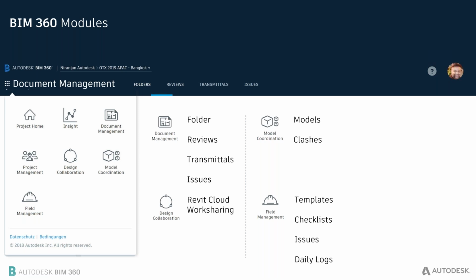It also allows us to capture site issues using cameras and pictures and then assign it to a specific department or users who's responsible to resolve it. And then you can also track it, how much are currently open, how many of them are resolved, and so on. It also helps us to track the daily logs, what we are working. So how many companies, how many hours of work, and how many users, I would say a labor who has worked on site for a specific day or something. We can log that effectively.